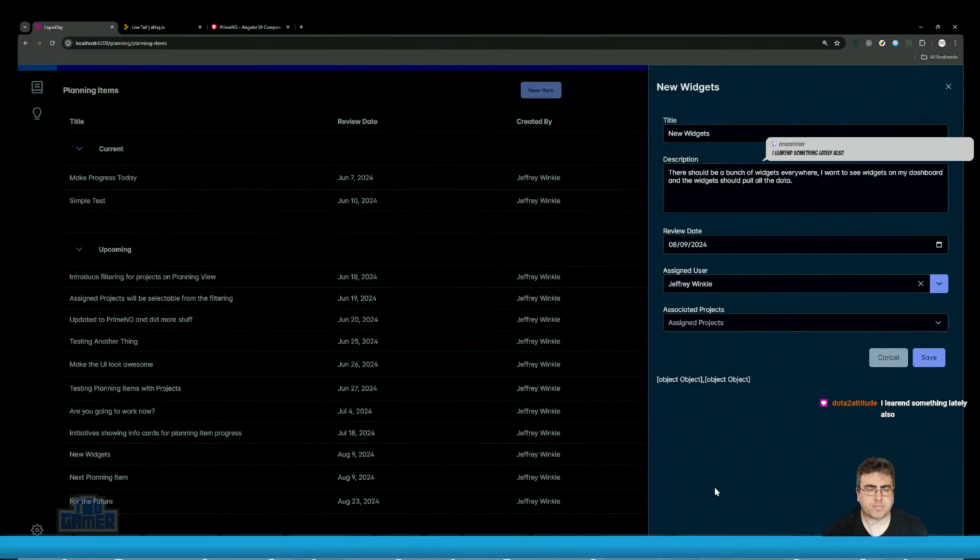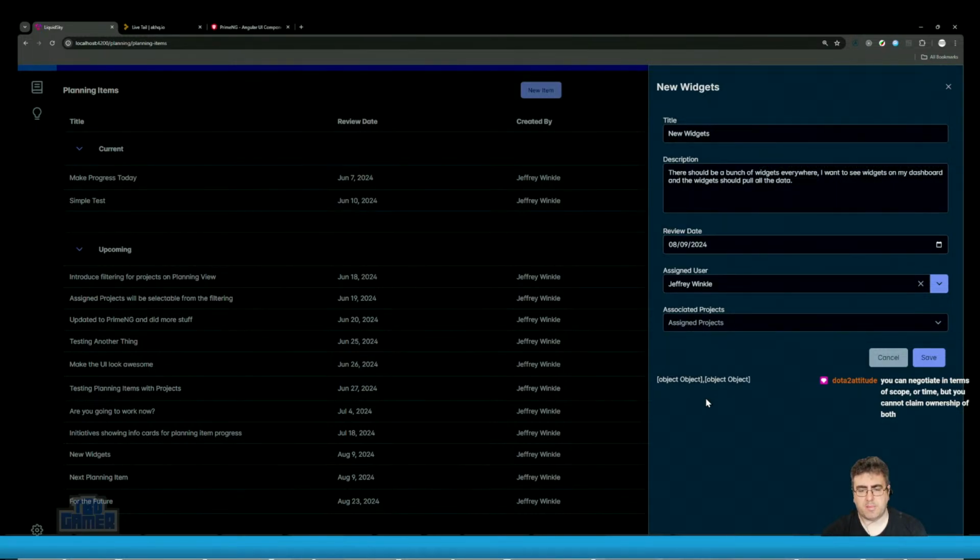So the idea is to try and get them to coax out those as requirements, and they can attach screenshots to the requirements, and then those can be used by the developers when they sit down with the PM to say, okay, that's actually one story, that's another story, and then you'll be able to select them and split them off as actual stories and pull the requirements and the screenshots through, etc.